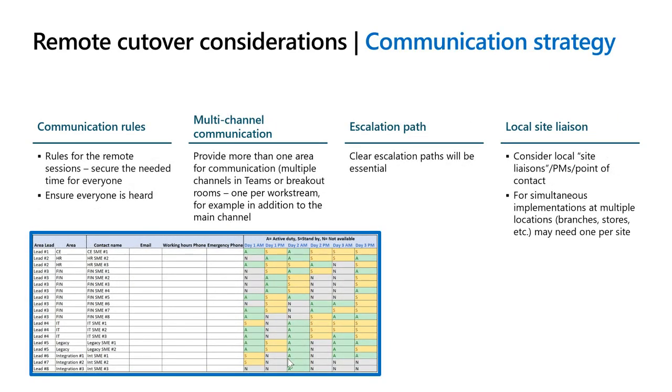Here's an example of a resource calendar with commitments. Available means they are literally there on Teams within 30 seconds. On standby means they respond within 5 minutes and they're at their desk working within 15 minutes, right? And not available essentially means you can't rely on them at all. They are not available, full stop, right? Have something very specific, very defined in terms of resource availability, right?